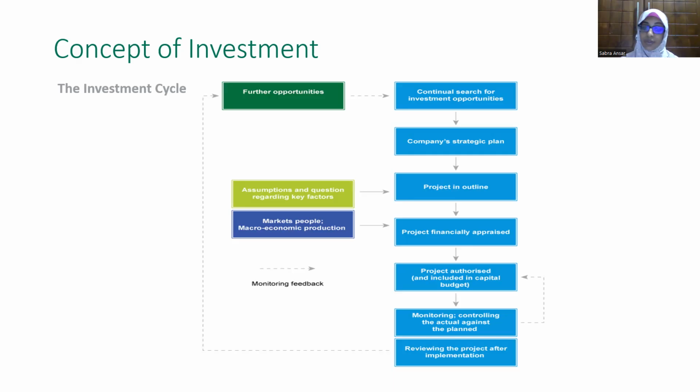Obviously after that, what happens is you put in the budget, and then the activity happens. After a particular period of time, the company will go back, look at the budget, compare it with the actual and look at the variances. See whether it is an adverse variance or a favorable variance. Based on that, the implementation will be reviewed to see, okay, what went wrong?